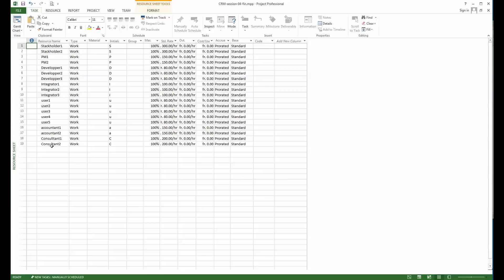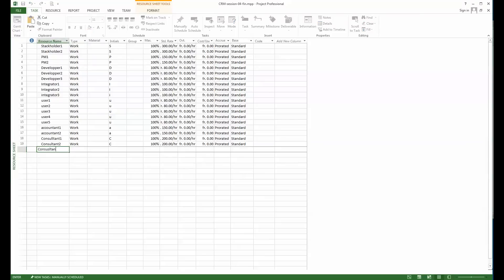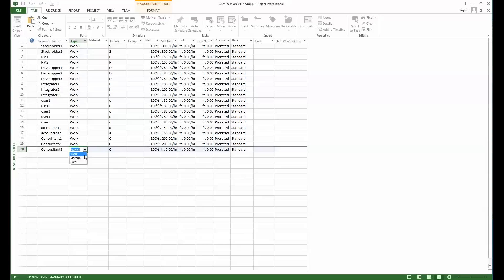When I define one of those resources, I will here admit that I have to add a consultant. This will be general for any resource, just so you see how we proceed. I will add consultant three. Now you see the kind of resource can be defined either as work, material, or cost. For me it's a work cost.